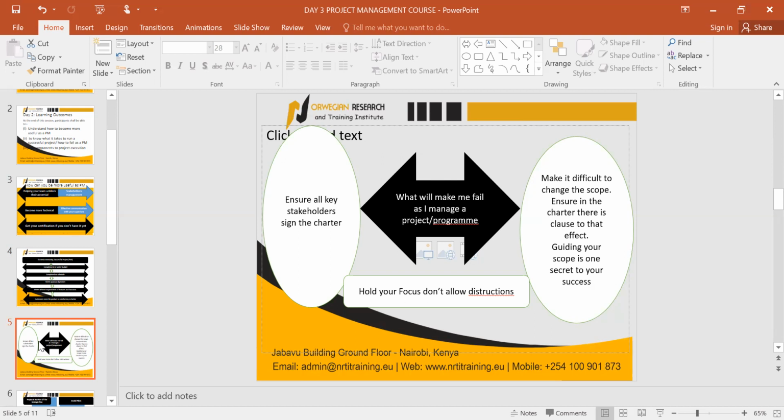He will give you the money in phases. Perhaps he first gives you something like 4 million, and you start the work. After that, you develop a BQ and make a request for additional funds to continue with the project. Then they also come to visit what you are doing, and when they visit, they tell you, no, I never expected a door to be like this, I want you to raise it like that. Anything they tell you they don't want the way you have done it, when you have already done it, it simply means you have already incurred cost.